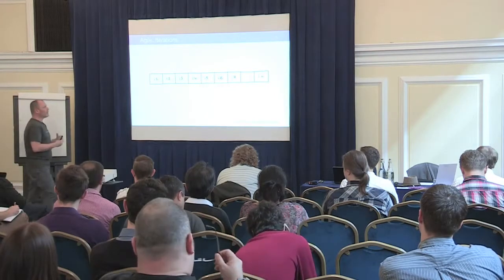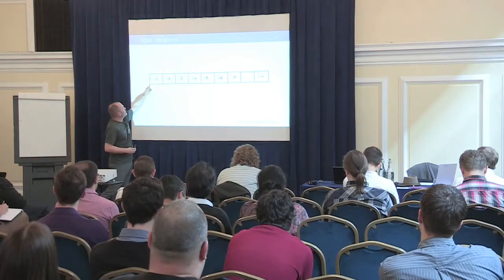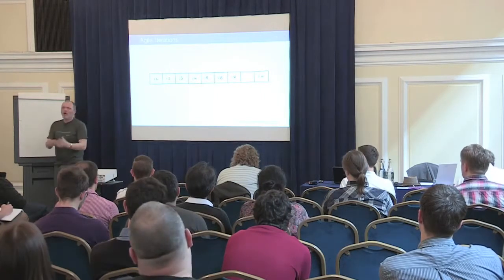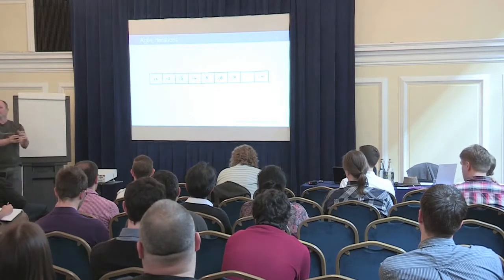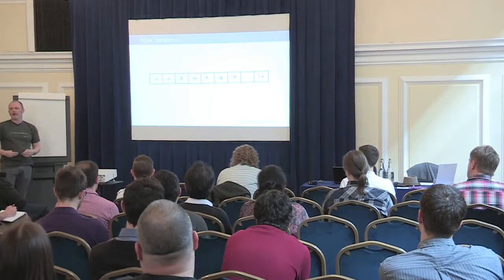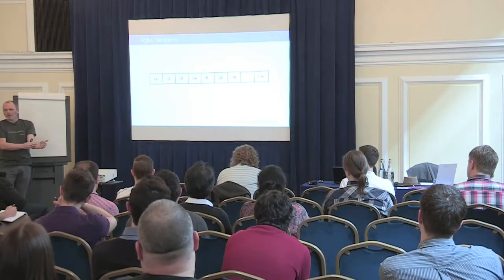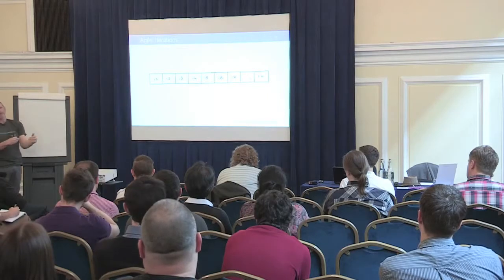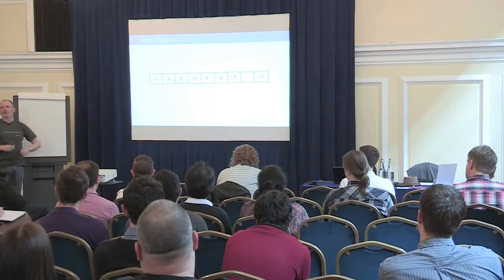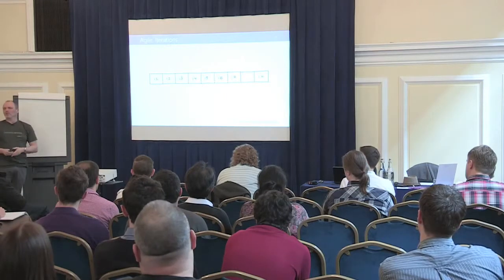So I usually consider them slightly more binding, as in the contract way of speaking about binding. Let's say, okay, I'm going to define here what I'm going to do, and I'm going to finish it exactly at that point in time. That is very hard, to come up with the exact amount of work that you can do in such a mini project, right? So we usually say, okay, we're going to work on these work items, we'll try to get them finished, but it's not the end of the world if we don't finish all of them. So if I have 8 work items defined that I want to do, and I finish 7, I'm pretty content about that. And the 8th one, well, we'll bring it up in the next sprint or the next iteration, right? So it's less a way of getting these mini projects out.